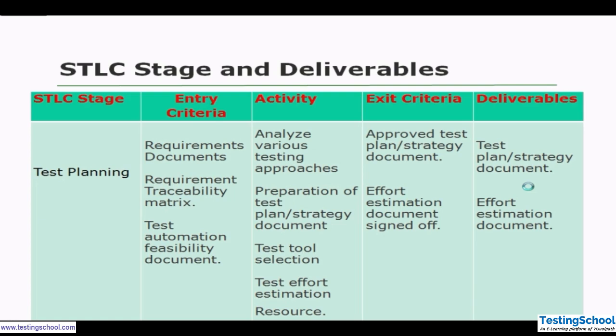And what do we deliver after this stage? We deliver the test plan and the effort estimation. You can see in the last pane, that is deliverables. So after the test planning, what do we deliver to the client? We deliver the test plan and the test strategy, and we deliver the effort estimation. So this is the deliverable for the test planning phase.